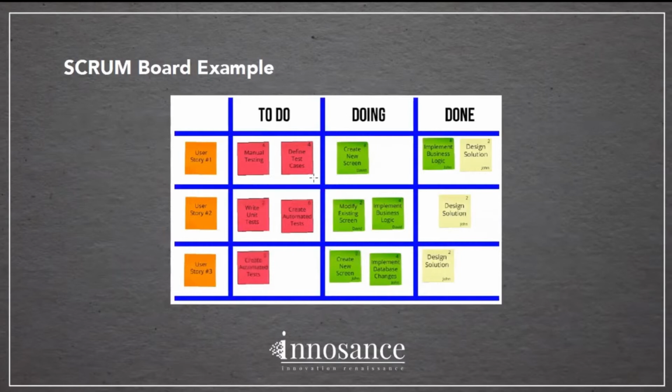So we can simply use a whiteboard and divide it into 4 different sections. On the very left-hand side we can put the product backlog items, and on the right-hand side, the to-do side, we can write down on sticky notes the items that we have prioritized and committed to work on in the next upcoming sprint. This Scrum board changes in every sprint.